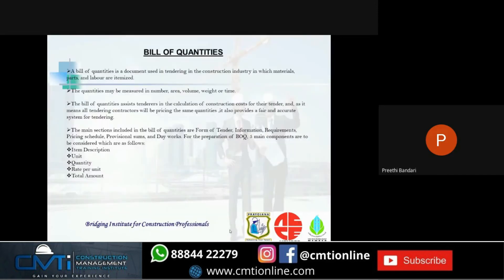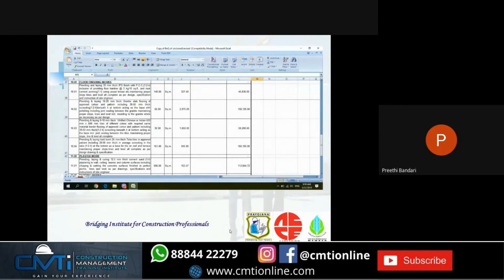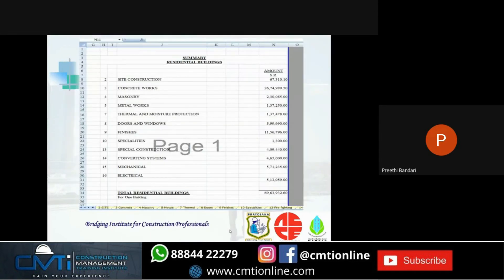What is the bill of quantities? The bill of quantities is a document used in tendering in the construction industry, in which materials, parts, and labor are itemized. The quantities may be measured in number, area, volume, weight, or time. The bill of quantities assists tenderers in the calculation of construction costs for their tender, and ensures all tendering contractors will be pricing the same quantity. It also provides a fair and accurate system for tendering. The main components of BOQ are: item description, unit, quantity, rate per unit, and total amount. This is how the BOQ is done — each description is given under each topic and what rates to be included are also specified. This is the summary at the end.